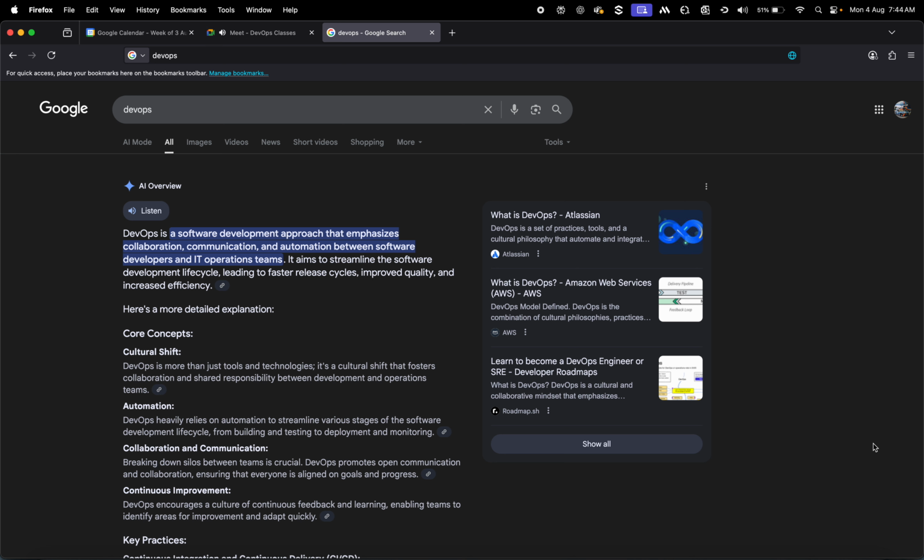That's one thing. And another thing, as I mentioned, there is no communication. So we have no idea when that will happen. Of course, when we ask, they'll send a mail or something, but there is no official confirmation of when it has to be done. There is no release plan, something like that, so that everyone knows what's happening and when it is going to happen next time. So this is the current situation.